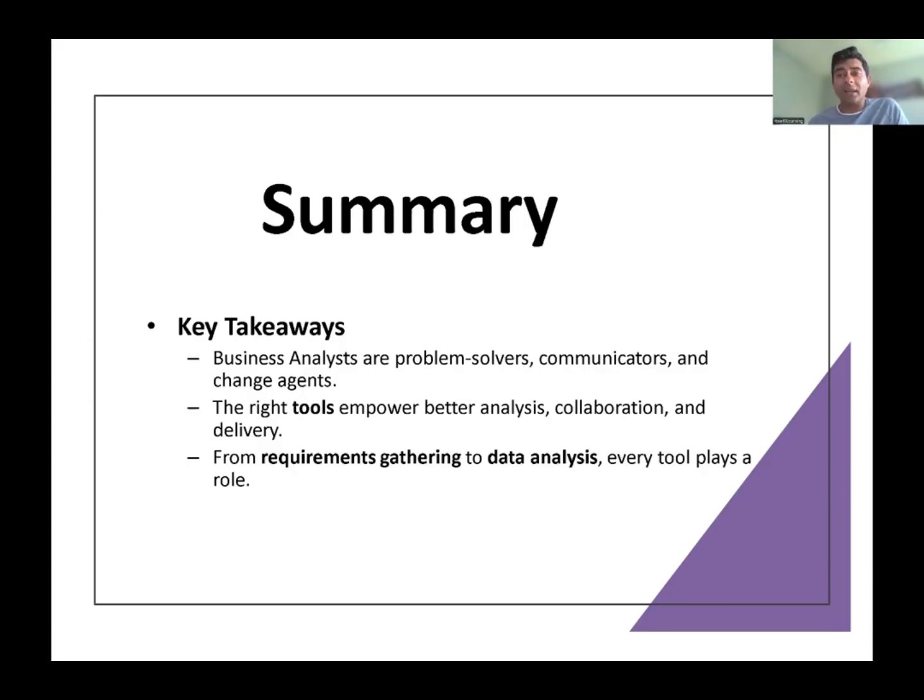And then it comes to the sprint planning when it is the right time to do this user story, which you will be told by the project manager or the stakeholders, like when they want these user stories to be done. Once the user story comes to the planning, it comes to the sprint. When the sprint starts, the sprint is always 2 weeks. The user story will be developed by the developer, tested by the QA. If they have any questions, they will come to you. You have to answer them.